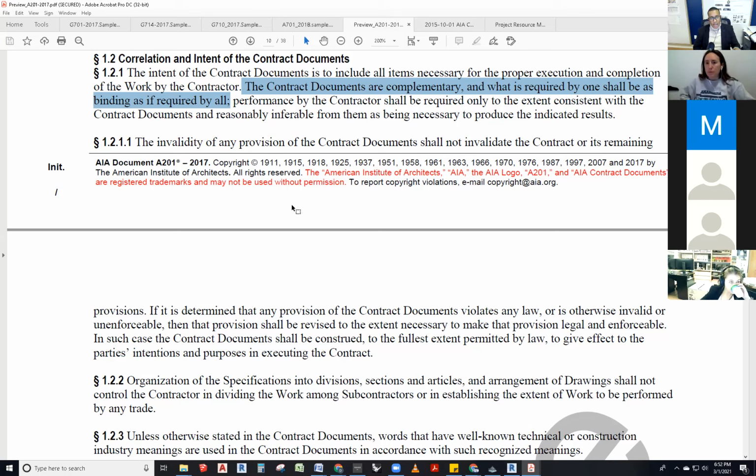But guess what? That may become a change order if there's a cost implication to that color, and you may have to respond to that as an architect because that was an error or omission of yours. Right. But the contractor shall let you know as soon as he sees it, because the shop drawings get reviewed by the contractor. In fact, if the contractor hasn't seen it, you should not even see it. You should not even open it. It should have a stamp that says reviewed and approved by the contractor before you see it.